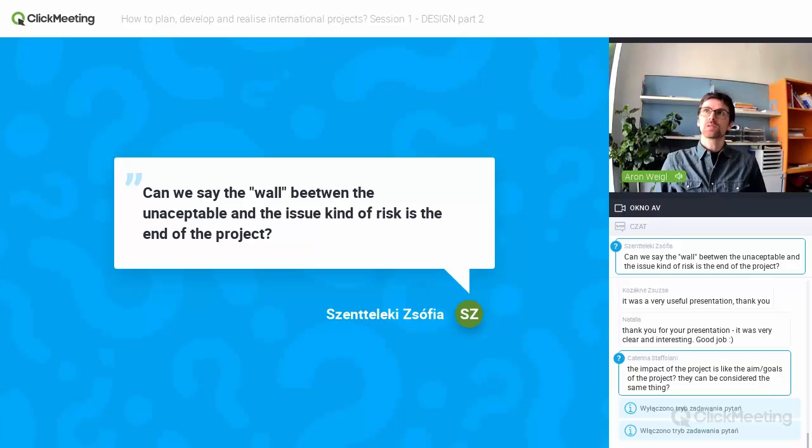In this case, you could lower the consequences because you can define already in your project design that if a pandemic occurs, we will do our training online. So the consequence of this pandemic on this certain part of your project would not be catastrophic anymore.